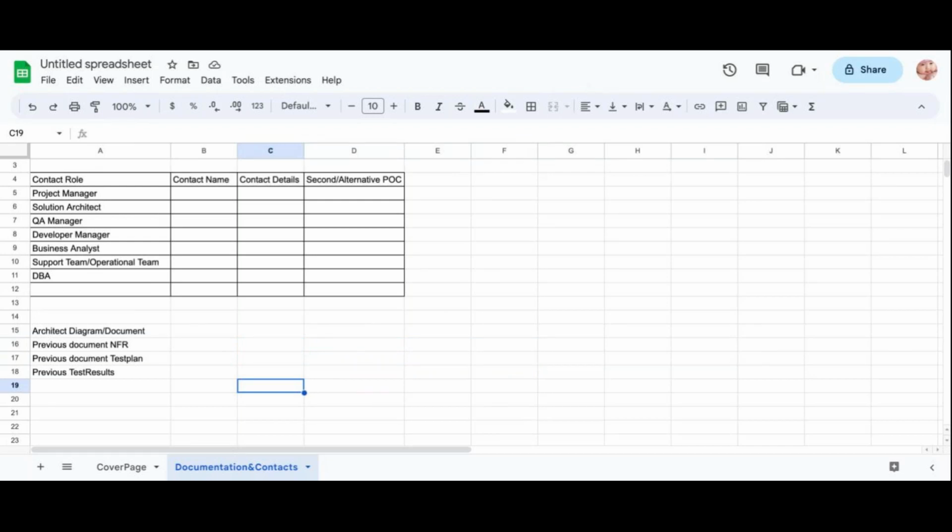Okay, first the application should be stable, when it starts and ends. Then the second thing is very important: when they are expecting the execution of the first performance test. Please note it down and ask this type of questions in the meeting. So when they are expecting the first test, and when they are expecting the overall test. Make sure, based on buffer time, you give some tentative date. First ask the date. If not possible, you give your convenient date, then we'll see.